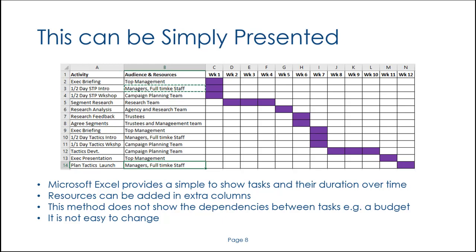Using an Excel spreadsheet you can set up a very simple task list like this to help you control your project, adding in columns for extra resources as required. The only thing it doesn't allow you to do is identify dependencies between different tasks. I would recommend this approach if you're a smaller charity or on a limited budget — you can get started using a simple project plan built in Microsoft Excel.